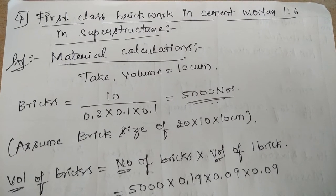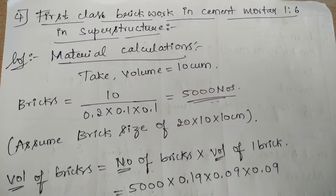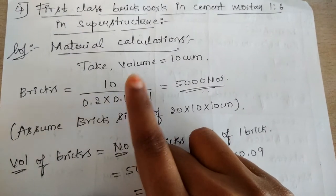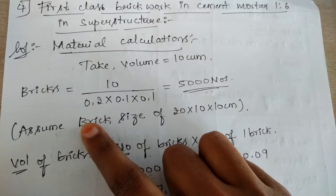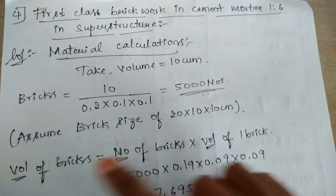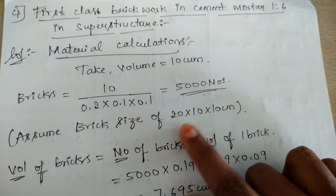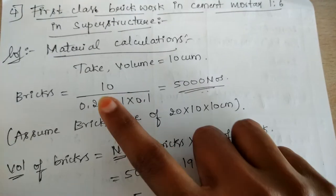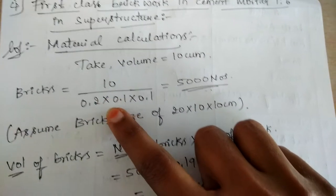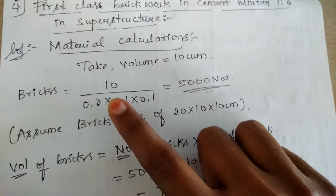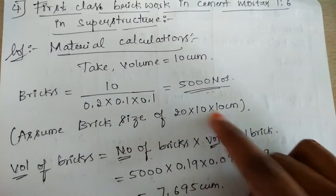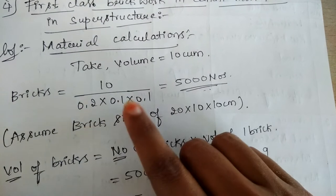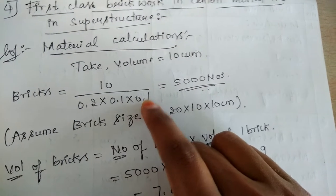So now we have to find the quantity of bricks. The quantity of bricks will be found out by dividing the volume by the size of the brick. Let us assume the standard size of the brick as 20 by 10 by 10 centimeter. Writing this value in terms of meter, we divide all three values by 100, giving us 0.2 by 0.1 by 0.1.